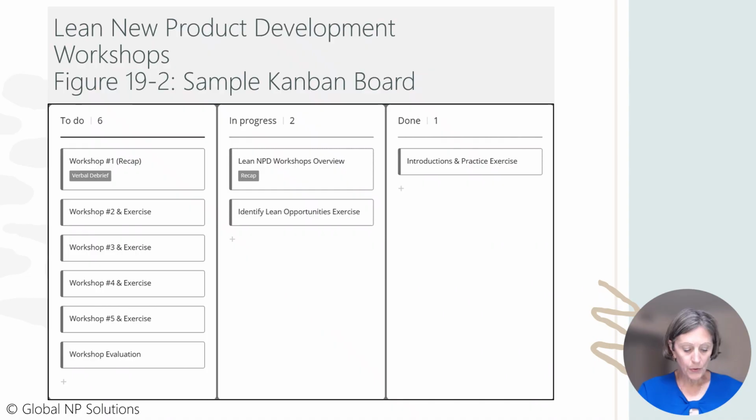During a workshop, participants record ideas, learnings, and unknowns on sticky notes that are arranged in clusters using affinity diagram techniques. The purpose is to focus on higher level themes and categories in problem solving and decision making. Kanban board. Technically, a Kanban board shows only the planned work, work in progress, known as WIP, and completed activities, as shown in figure 19-2.